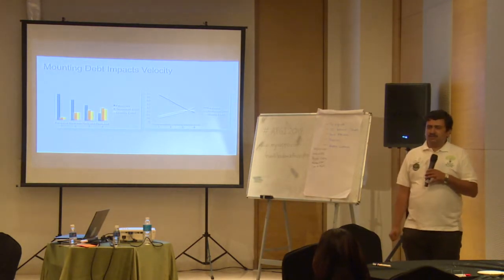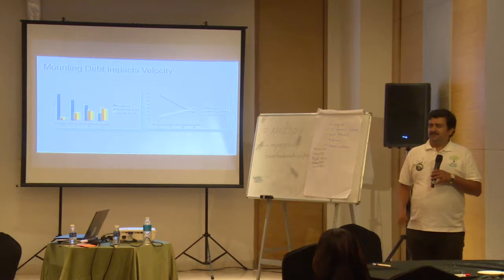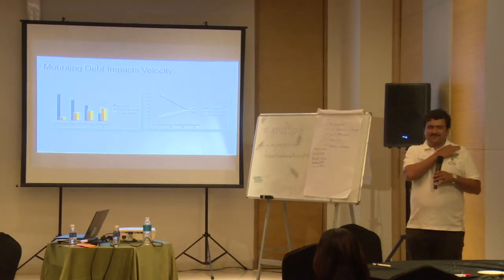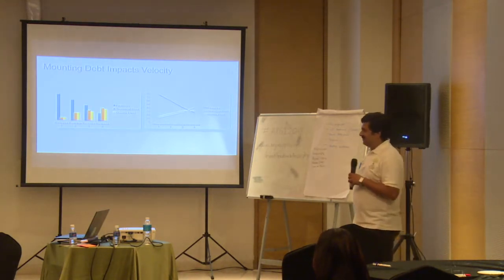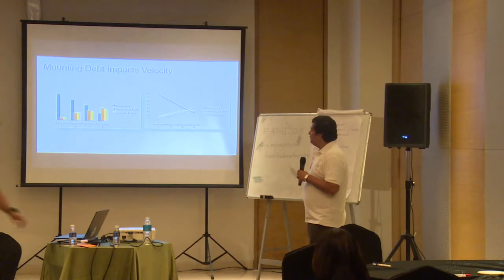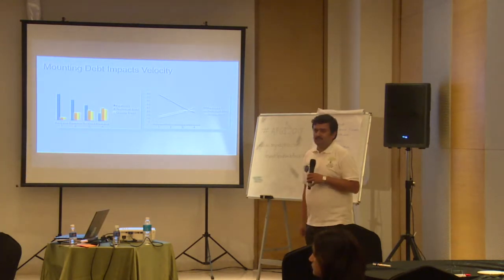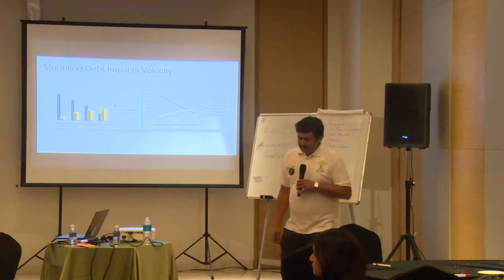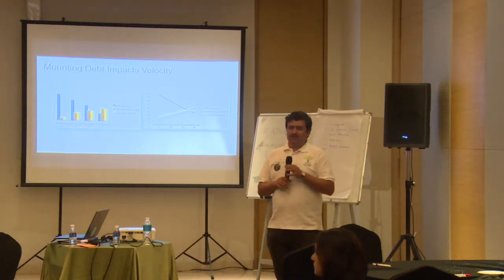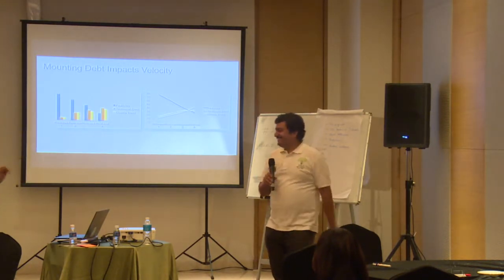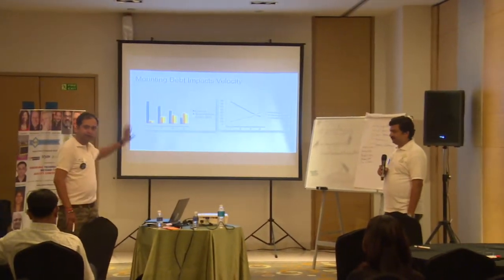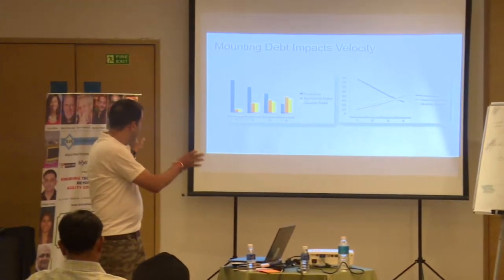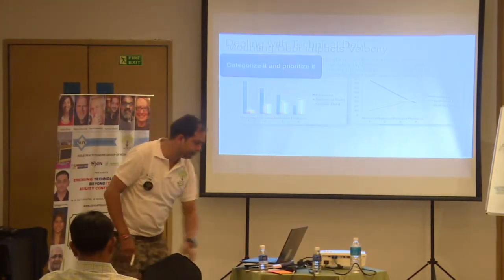Any product managers, product owners, business decision makers? If they're not there, go and give the message to them that if you're looking for a new feature every time and you're ignoring the tech debt, your velocity will go down. That's the message for them. Unfortunately, those are the guys who don't really want to attend such conferences. Yeah, they are so busy making money. So that's where you have coaches who have been hired to change their mindset. These are real-time data. We have eliminated some for the sake of confidentiality, but this is real-time data, so there is nothing hidden in this.